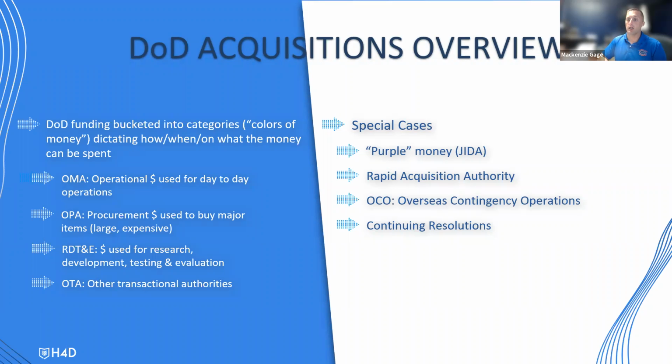So if something was supposed to start at the beginning of the DoD fiscal year, which is 1 October, and we're going to sign a contract and it's going to be great and it's going to be fully funded based off the budget that was submitted, but that budget doesn't get approved, there's no money to start that new contract. So that contract can't start until the full budget is approved, signed, and we move out of a continuing resolution.